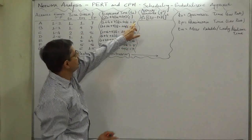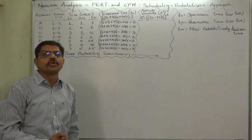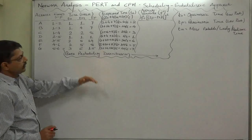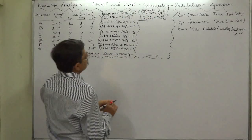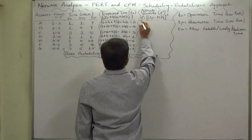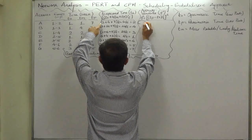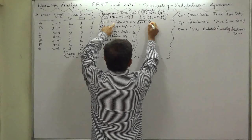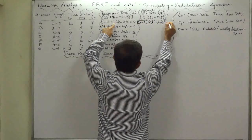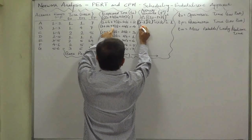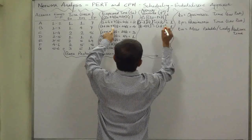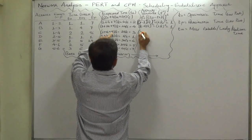We can expect activity A to be completed in 2 weeks, activity B in 4 weeks, and so on. Now let's calculate the activity variance — the variance of time for all activities. According to the beta probability distribution, the formula is: Variance = ((TP − TO) / 6)². For activity A: (7 − 1) / 6 = 6/6 = 1, squared = 1. For activity B: again (7 − 1) / 6 squared equals 1. For the next: (8 − 2) / 6 squared equals 1.